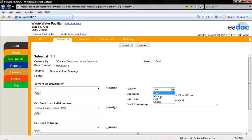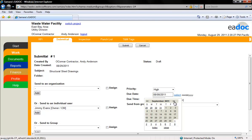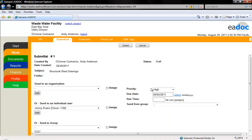Once further action has been taken on this submittal, the recall return button disappears. Further action can include responding, forwarding, approving, or closing. After you edit the submittal, you will need to submit it again.